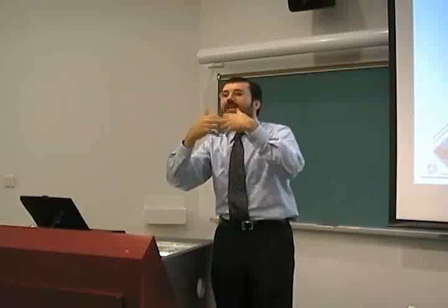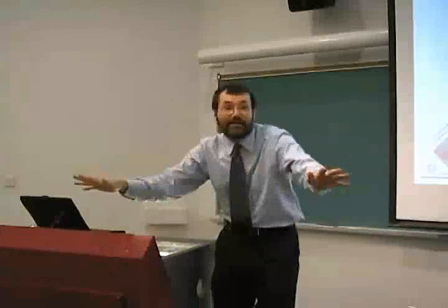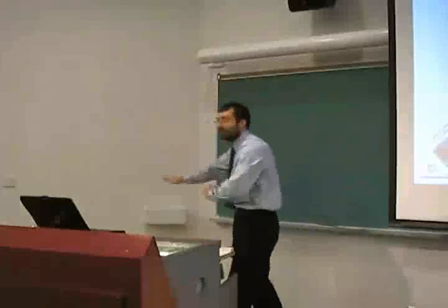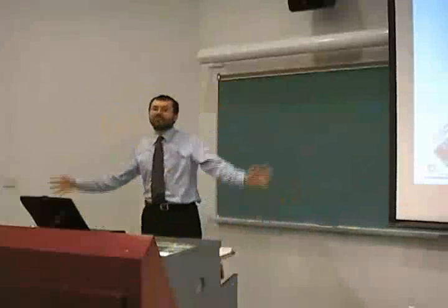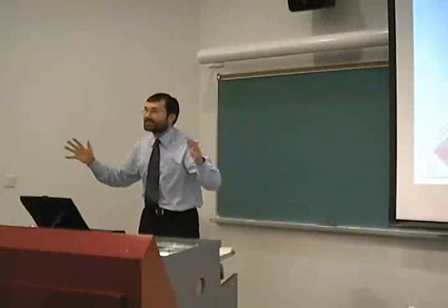Okay, but the point is it can be done maybe in 2 months with relatively little work. You get it in the hands of the users. And then at least they have something. And if everything else fails from that point on, at least they have something. Whereas if your approach is, we're going to develop everything, a big system with thousands of requirements that will take us 10 months, that's no good.